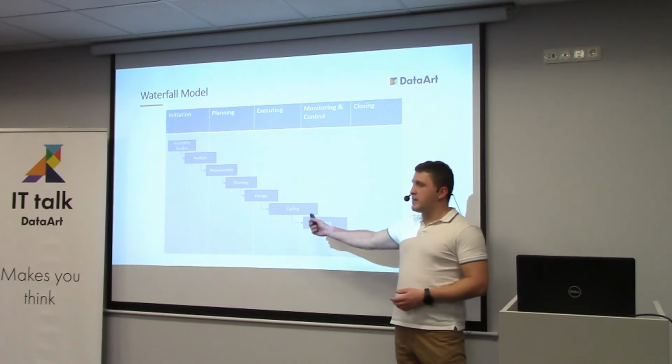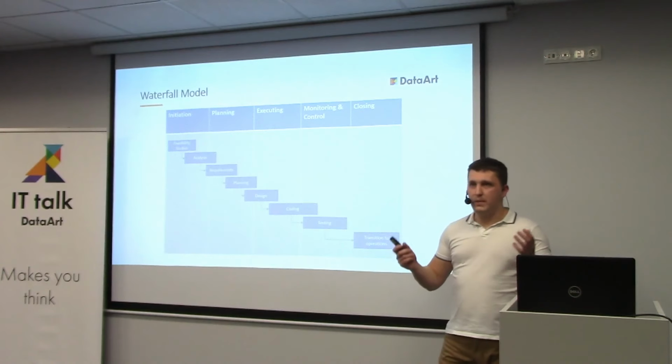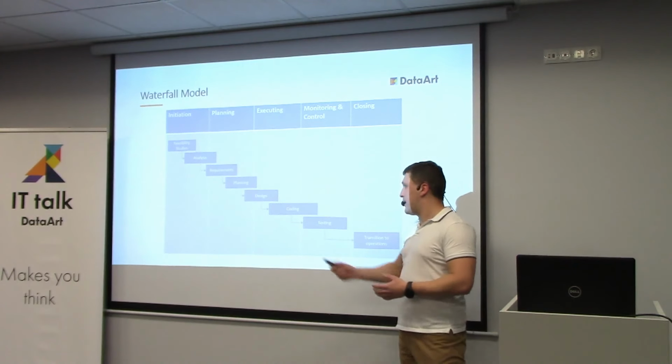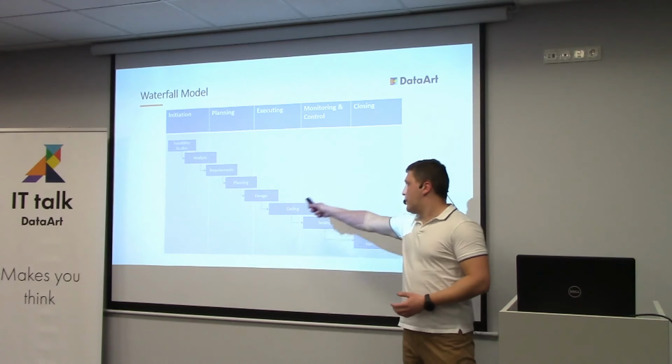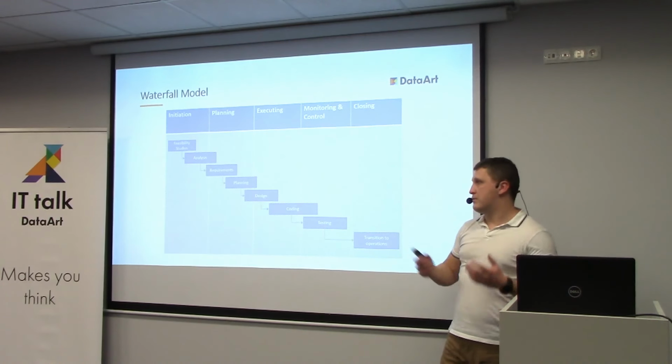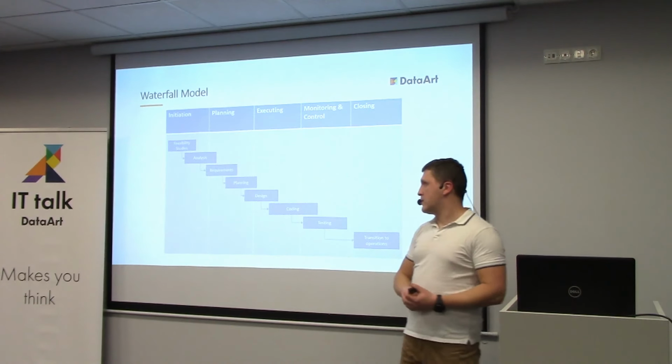And since coding can take several months, and millions of dollars can be spent on it, it'll be way too expensive to come back to design stage to fix the mistakes. And that works virtually on any stage here.